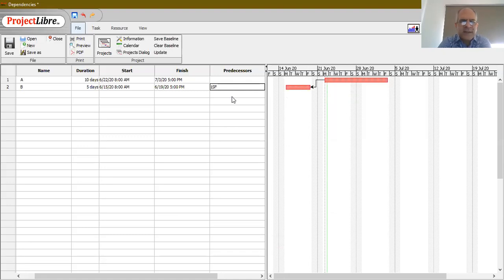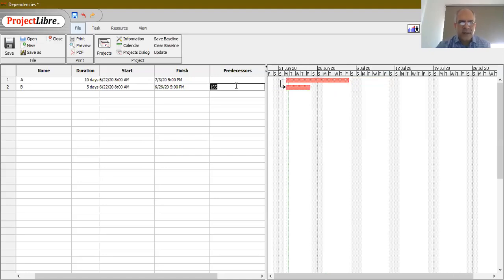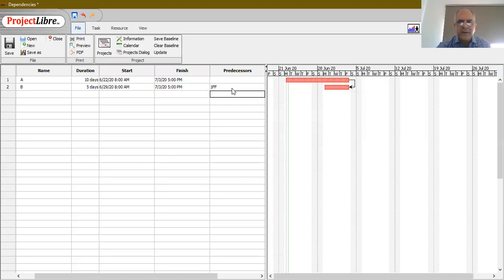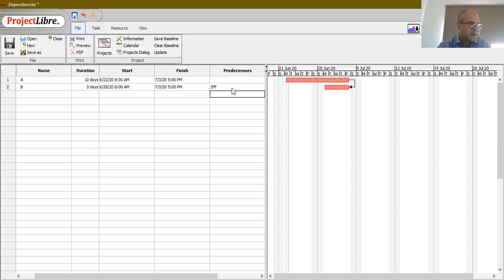This is why Start-to-Finish is called an illegal dependency — it just messes up everything. If you encounter a situation requiring SF, you need to resolve it by converting it to either a Finish-to-Start or a Finish-to-Finish dependency. That will keep things neat and manageable. Most project management texts declare SF as an illegal dependency, and many better project management software tools don't allow it at all.